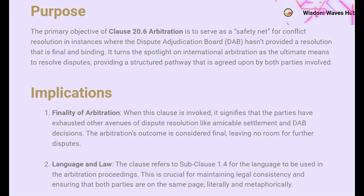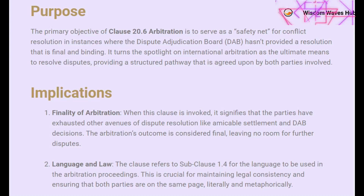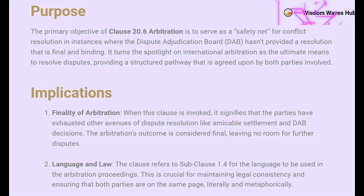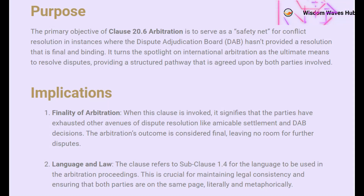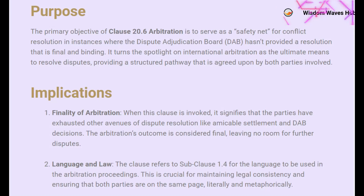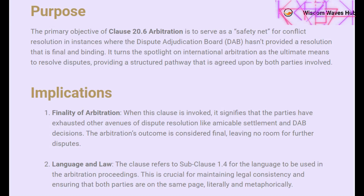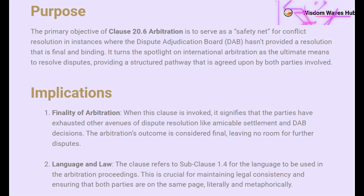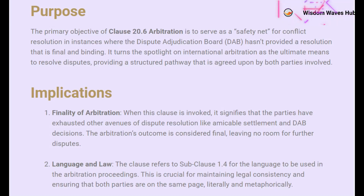Now that we've set the stage, let's delve into the primary objective of Clause 20.6. This clause isn't just something you stumble upon — it's a meticulously designed safety net. Its primary role kicks in when the Dispute Adjudication Board, or DAB, fails to provide a resolution that both parties consider final and binding. In such cases, Clause 20.6 elevates the matter to international arbitration, providing a structured and universally accepted pathway for conflict resolution. With this clause, both parties agree to a mechanism that has the gravitas and structure to deliver finality in any dispute.